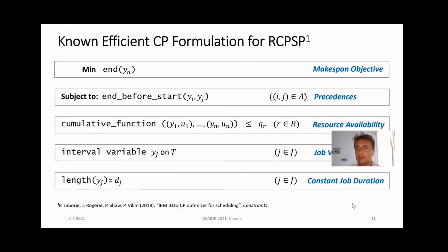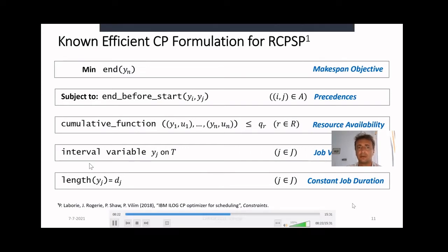We did lower bounding and upper bounding. We said that we want to try out a couple of combinations of relaxed models that could give us lower bounds. So when optimally solving these, we can basically derive valid lower bounds. We did work with the reduced durations only, giving us here something like the RCPSP minus, that's how we call it. We dropped the precedences, we dropped the resources, and changed the duration, a bunch of different combinations.